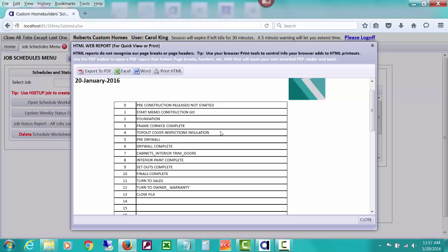So the only dates you're putting in when you're estimating these different stages to be done are dates for that, instead of a whole bunch of little tasks and the dates for all those, like call for T-pole and this and that, and trying to do all this work to put all these dates in. What I did was set it up based on the stages. You put in the dates for that, and then underneath each stage you can create lists of tasks or logs that you check mark as being done or not. You simply check them off.